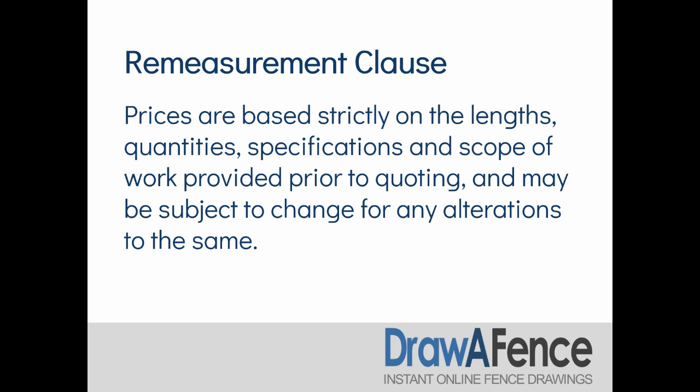Because obviously when things get smaller, you're also losing profits, and you had anticipated making a certain amount of profit on a project. So you want to make sure that you're not losing that by them making changes. So include a remeasurement clause on anything you do, even if you're doing a lump sum job, it's worth having this in there, because that gives you that little extra legal leg to stand on when things do change, so that you can update your pricing accordingly.